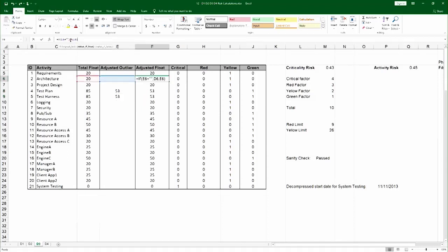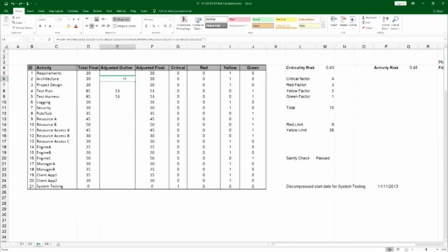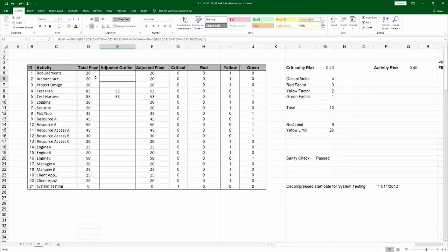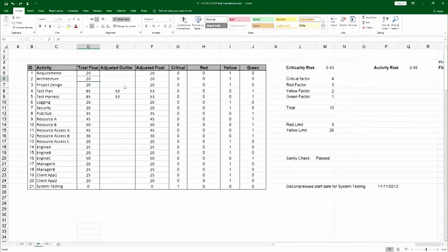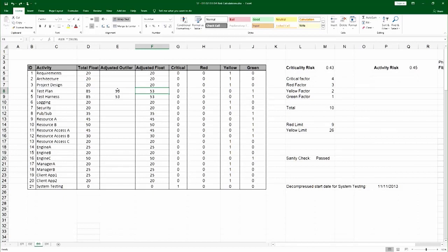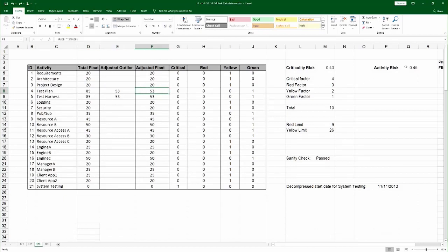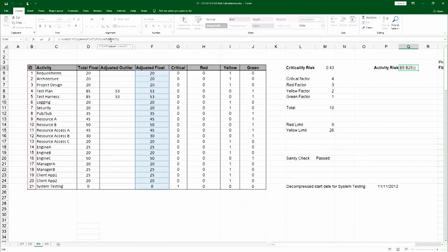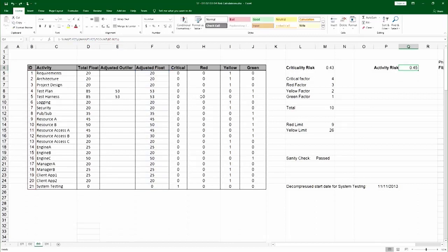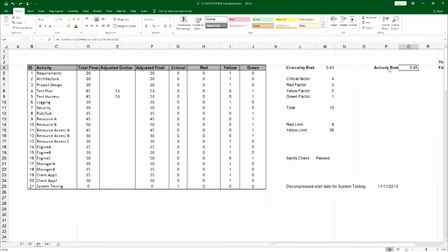This is the adjusted float column. This formula checks to see the following: if there's no value to the left, it takes the original value. But if there is a value to the left, it will simply pick it up and not use the original value. The activity risk formula actually uses the adjusted column. It doesn't use the original values. As a result, you can see it's 0.45 compared to 0.43, so it's fairly comparable.